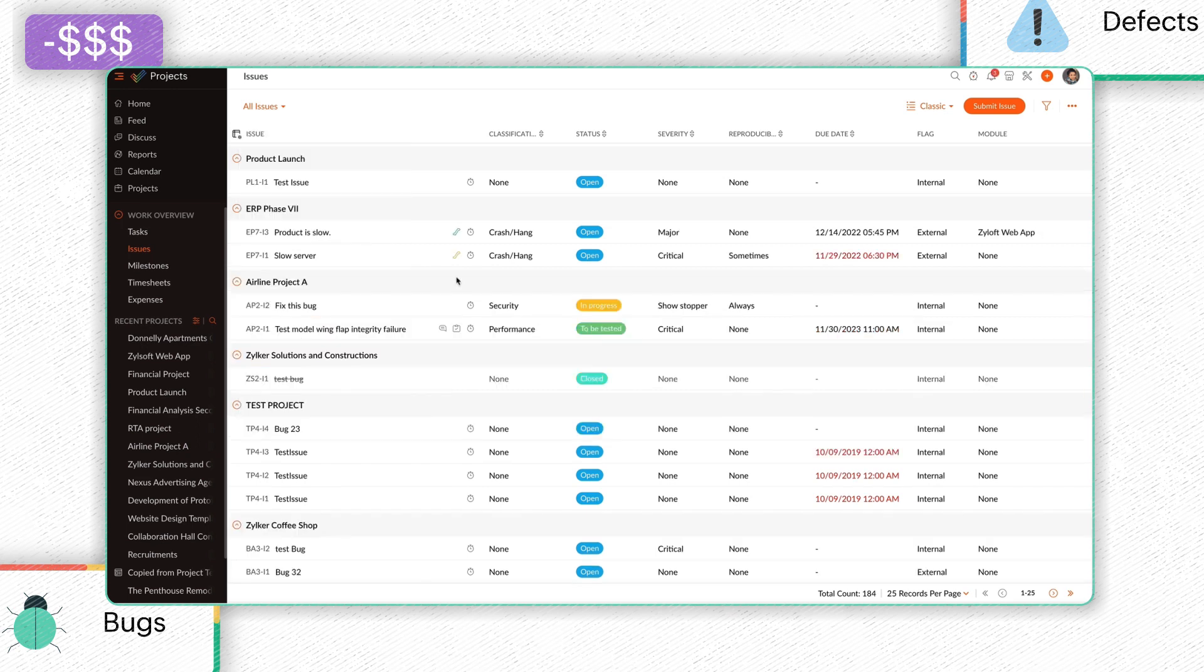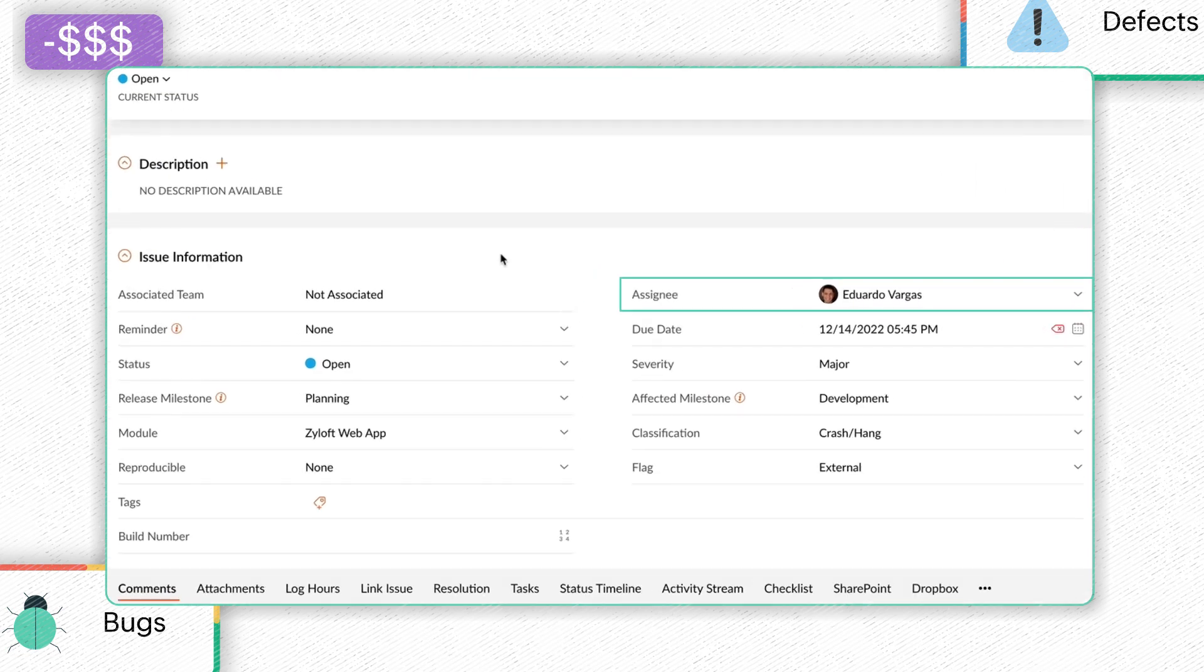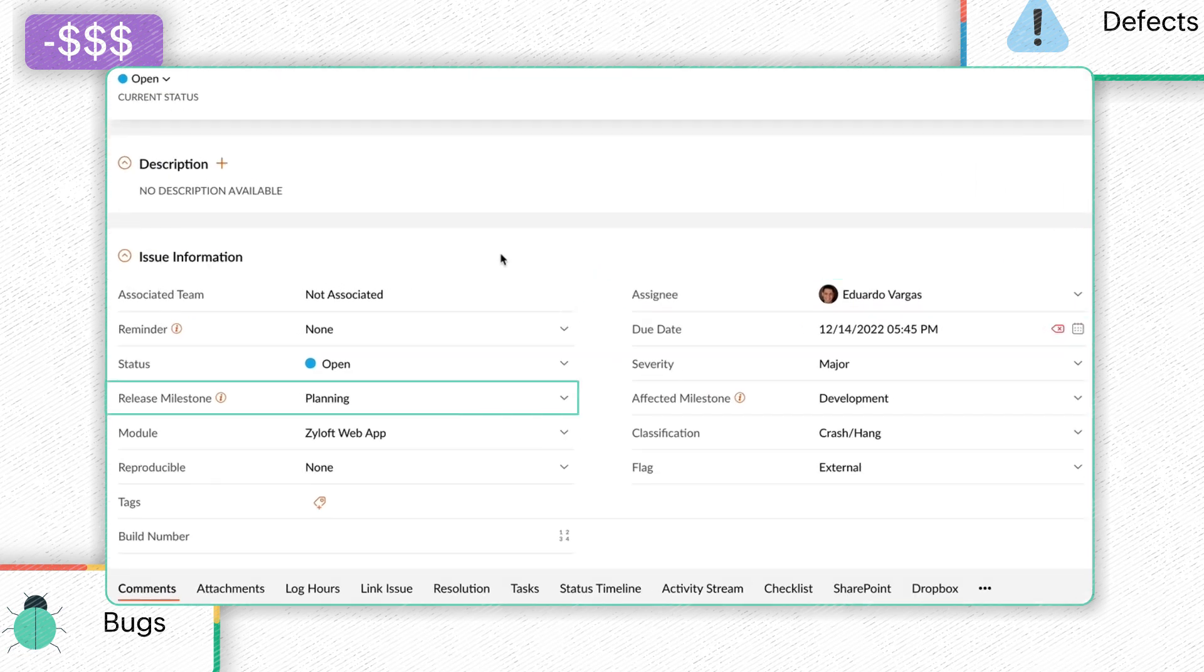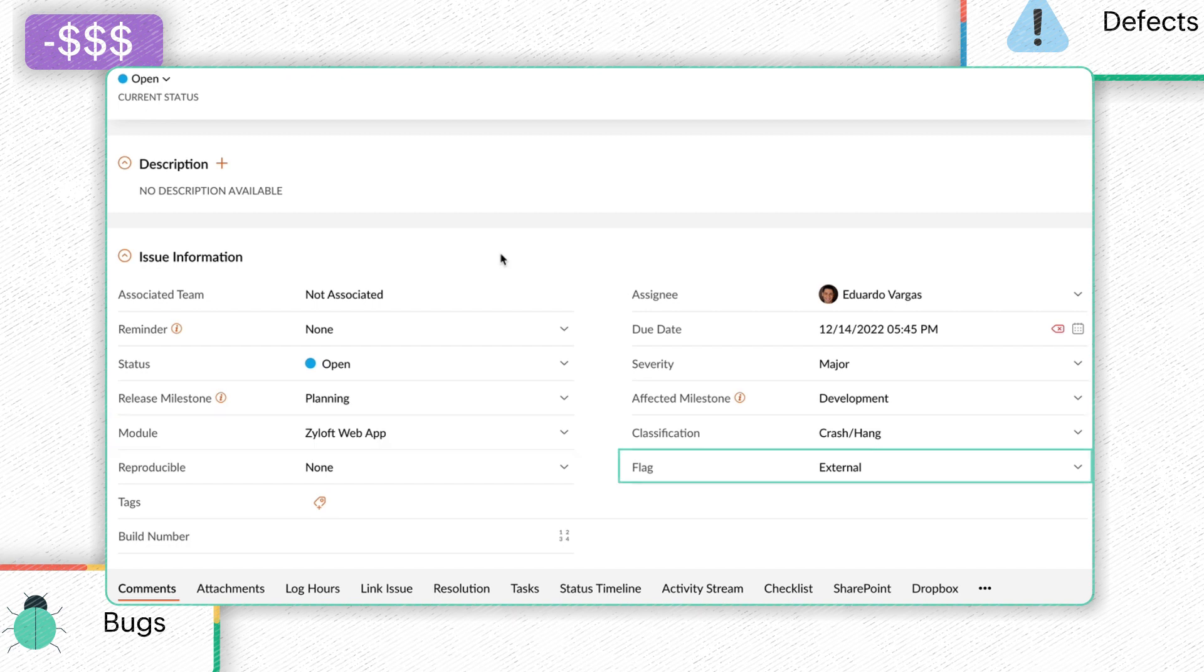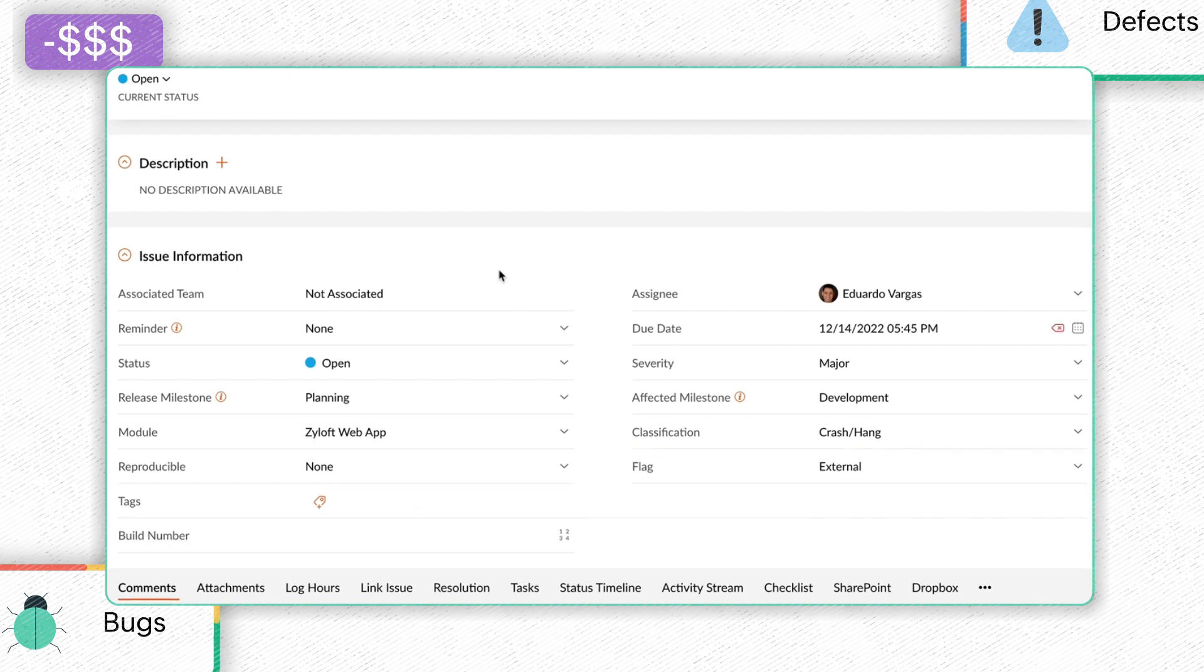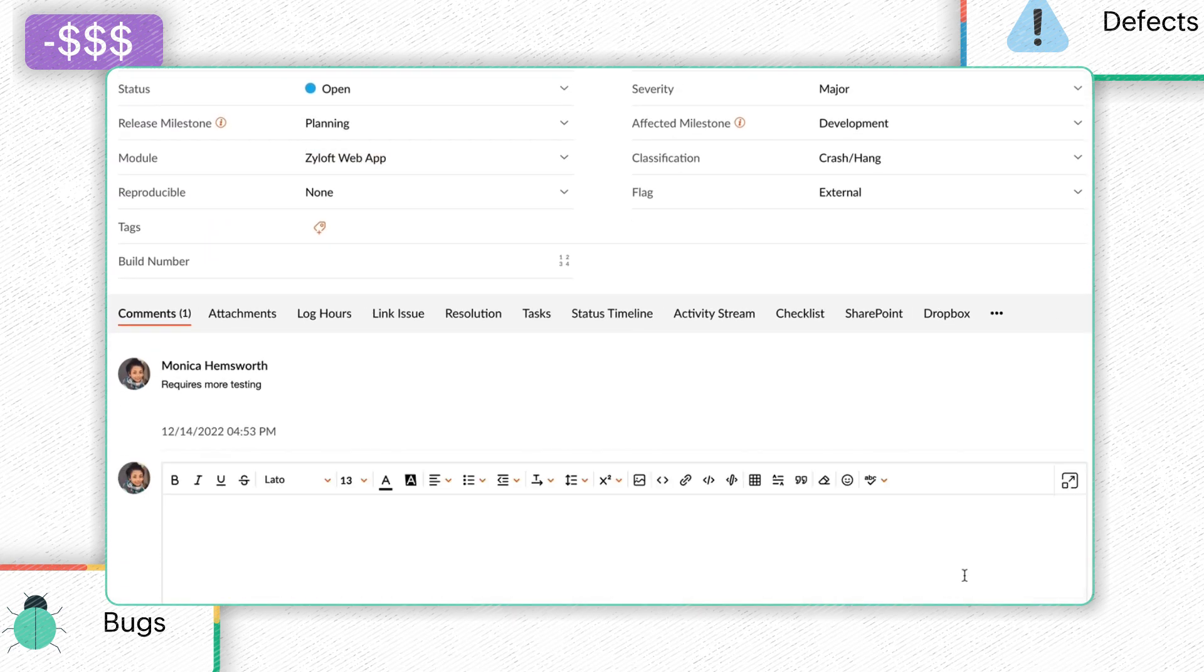The Issue Details page displays important information such as the Assignee, Due Date, Status, Severity, Release, and Affected Milestones, Module, Classification, Flag, and Tags. Users can also view the data captured using custom fields.